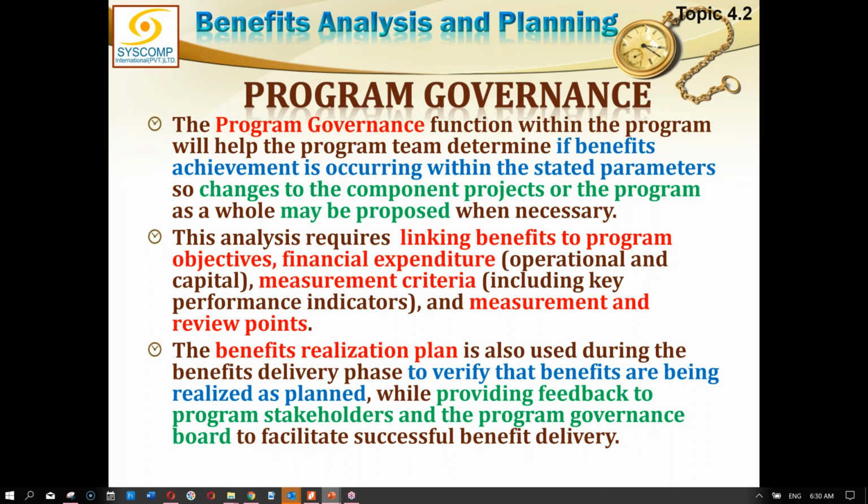As I was giving you a differentiation between a management plan and a plan, for the whole program management plan, program governance is the big, huge guideline for running this program. Remaining within the governance boundaries, the program management plan is developed, and it is composed of a number of other plans, and each management plan will have its own artifacts or detailed plans.